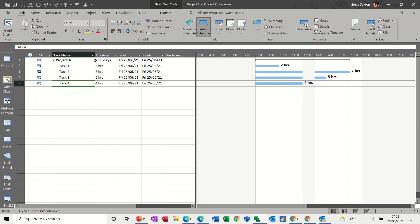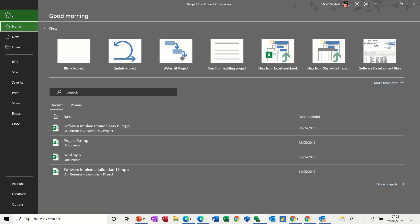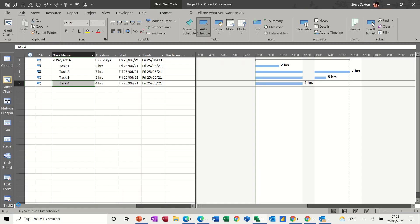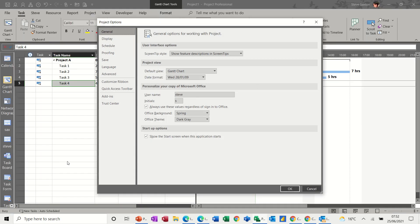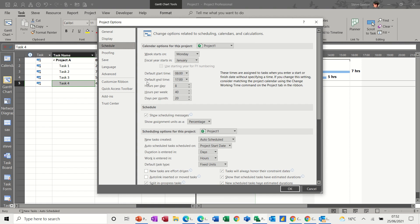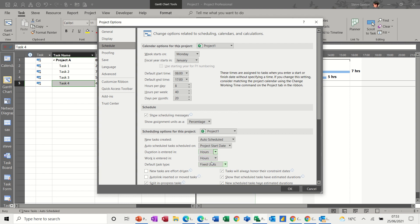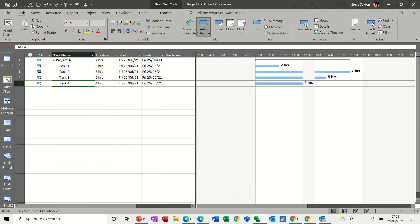Now, obviously, this is still saying days. So if I want to change that to hours, I need to go into File, Options, and Schedule. And then where it says duration is entered in days, you need to change that to hours. And then you click OK. And then that comes up with the duration for this day, which is seven hours. These are all going on at the same time, so seven hours.